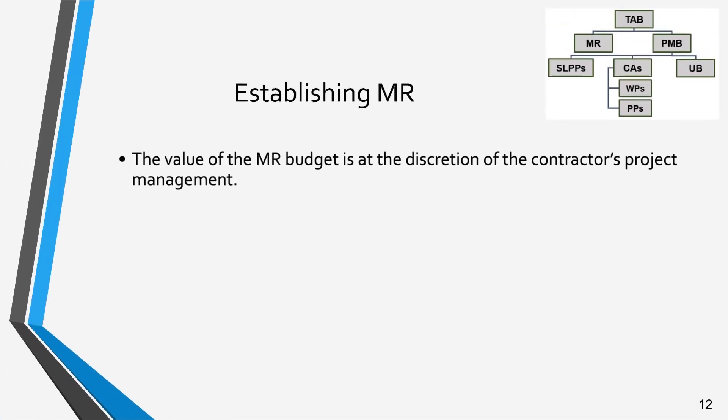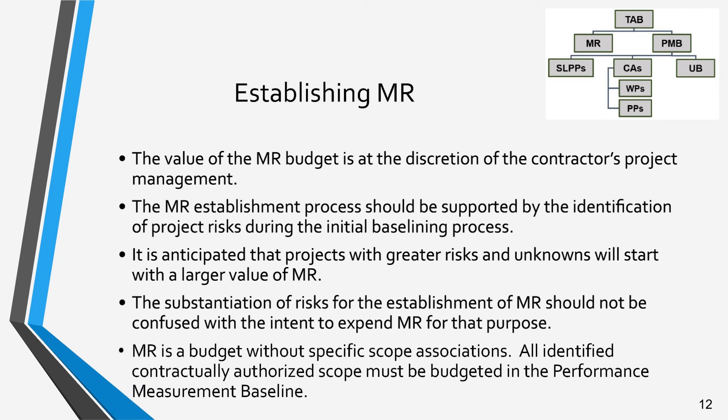The MR budget is initially established during the early baselining period after contract authorization. While the value of the MR budget is at the discretion of the contractor's project management team, the process should be tied to the identification of project risks and overall risk levels identified. It is anticipated that projects with greater risk and unknowns will have a larger reserve budget. However, there is no requirement that the application of the MR will be limited to the identified risks. In fact, if a contractor does this, it may be an indication that well-defined and probable scope has been left out of the baseline.